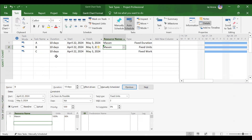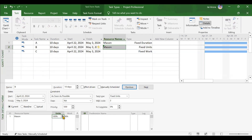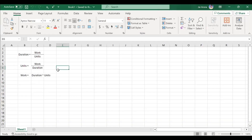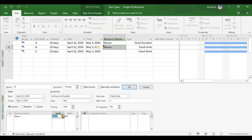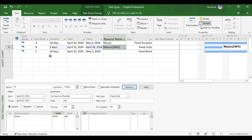Second case for fixed units: increasing units to 200%. MSP will touch duration first. Doubling the units means duration becomes half. After increasing to 200% and clicking OK, duration has become half — down to 5 days — but work has not changed. The activity completes in 5 days, but Mason works 80 hours over 5 days, meaning 16 hours per day. This is considered productive since work actually gets completed in fewer days.